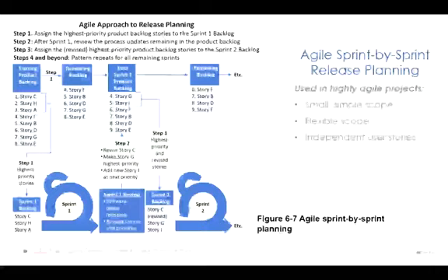Each sprint is defined as one week to three weeks usually, and in every cycle you perform certain tasks or try to consume the product backlog. And in the process of consumption, you prioritize the backlog.